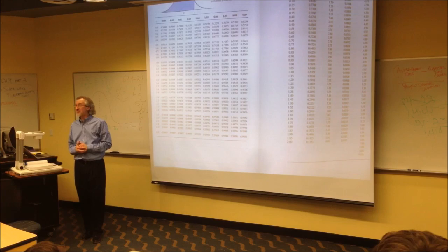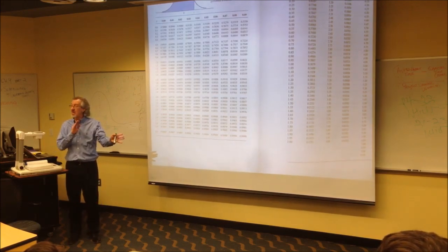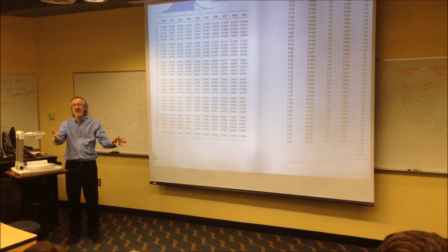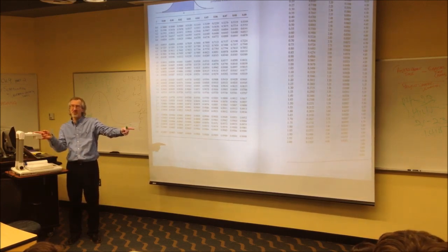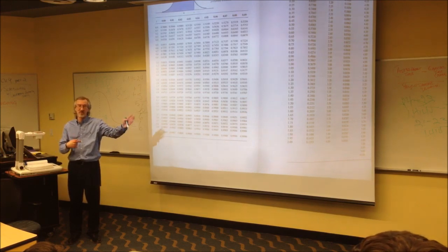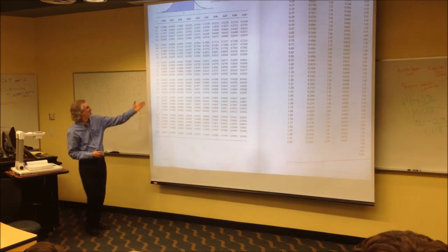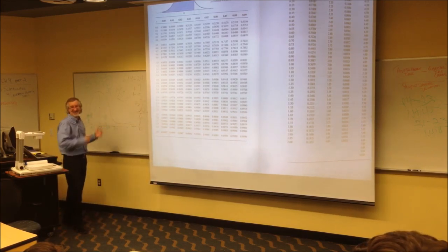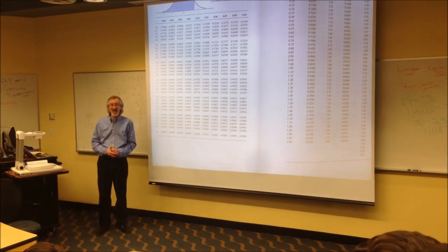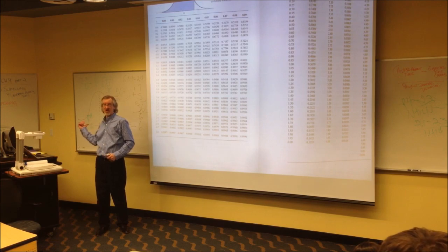It said, what's the probability that we're going to end up taking longer than the 25 units of time we just negotiated, and not being able to make that payment out of revenue, instead we'll take it out of our cash reserve. So it's the opposite, which is 8%, or a little less than 8%. It's this one, 7.93%, because it's the opposite side. Everybody see that? You can do the more than, less than. This is stats. It's really easy now, right?